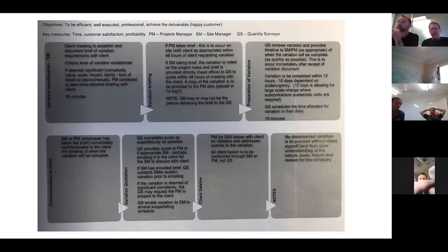So I'd go right down and put that in your process at the start. What's your process? Exactly. So the architect knows my process for variations. I'm not going to sit there and get 10 different subbies in. I know the square metre rate. I've got this, and this. This is what it'll be. And own it. Position it at the beginning, and if it's a larger one that does require it, you will go out and talk to them, and obviously get a specialist quote for it.